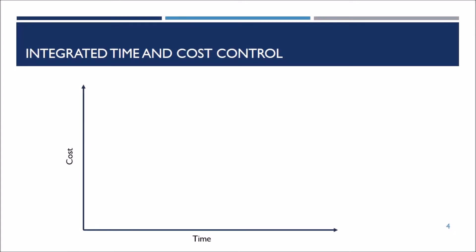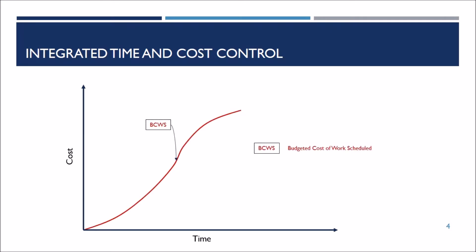In the slide, these terms will be clarified. On the x-axis, the project time is presented, and the cost is presented on the y-axis. The displayed S-curve presents the cumulative planned value, which is typical of most construction projects.